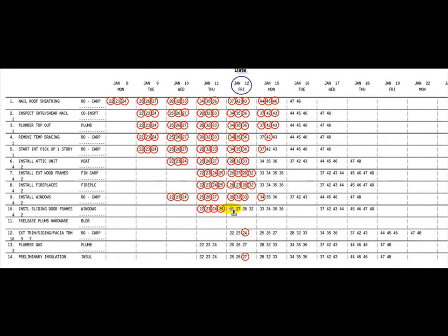This form is an example of progress being entered for this time period. The circles represent which units have been completed for this particular activity. It shows how easily anyone can mark the master schedule for progress. Completed means that the next scheduled operations can now begin.